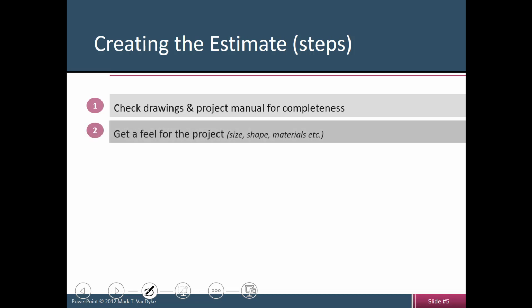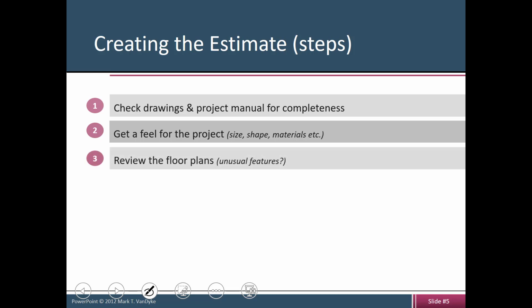You have to get a feel for the project. Look at different things. You look and see if there's any anomaly, if there is any particular unusual feature on that project, if it's a normal type of standard project, or there are things that you have to have special consideration for, if there are any long lead items and stuff like that. You better have an understanding about all of those before you even begin working on that estimating package. These are the absolute necessary steps you have to take before getting involved in calculations, quantity takeoff, and so forth.